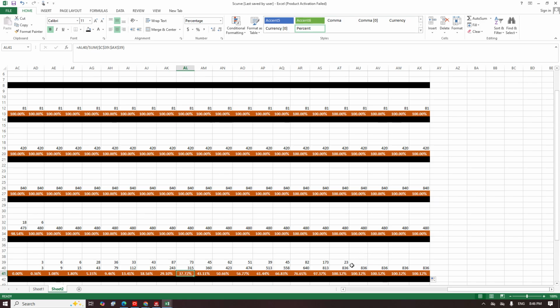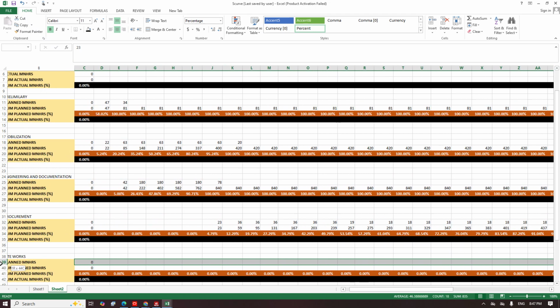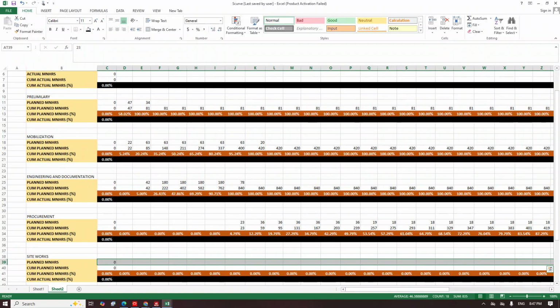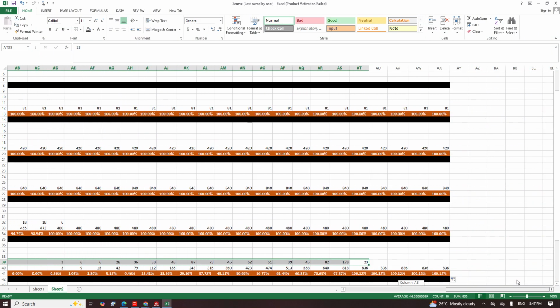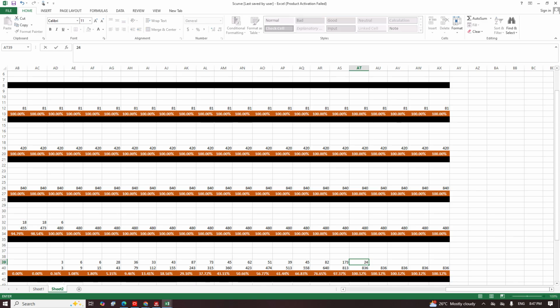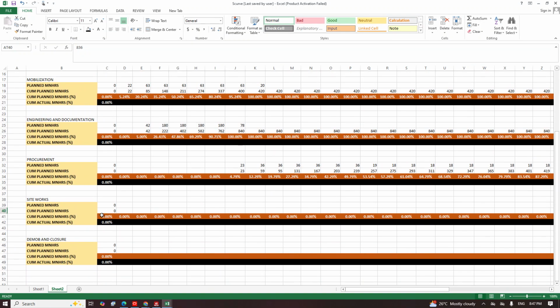So I just need to adjust it, but to know exactly what to change, I will select this. The total value here is 836. I will select everything on it, just to be sure. So this one is 835, and the difference between 835 and 836 is what we just need to add. So I just come here and add 24, and it's giving me 100%. So please learn how to resolve this. It's a common issue, a common error that normally appears each time we are doing this.